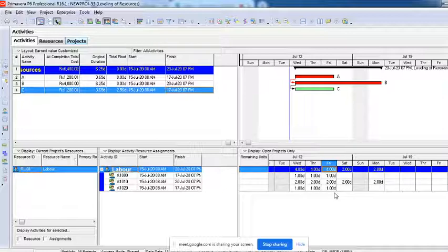Now what is happening? Let us understand. On a second day or a third day, I feel that the resources we have assigned are not sufficient to finish the work in 10 days. I'll repeat. After the first day or second day or third day, or before the start of the activity, I feel that the 100 units we have assigned to finish it in 10 days is not sufficient to finish within the time. So what will I do? Say that I'll increase another 20 labors. So now, which was planned for 100 units, now I am using 120 units to finish it in 10 days.